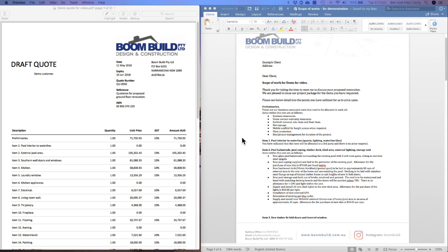First one is insurances. So when we're doing these large projects and even smaller projects, the builder still needs to have insurance, and he still needs to cover things like theft and anything that may happen to your property during the build, any damage that may happen to your build. And he needs to have public liability, workers' compensation for his staff. And this is a 12-month builder's expense that gets passed along.